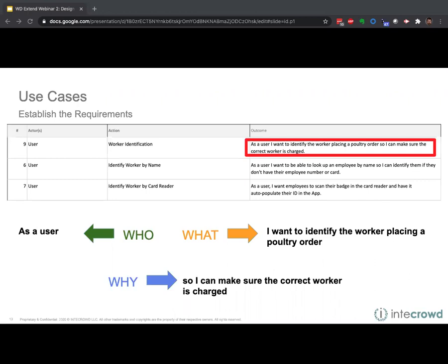These use cases can also be used to support your end-to-end testing as well. Since we've compiled all these use cases, you have a pretty solid basis for creating your test scenarios. And then as we iterate through the design and even as we go through initial build, as we continue to flesh out things, we can certainly add to these use cases if new or modified requirements start to show up. All right. So I'm going to turn it back over to Nicholas at this point.